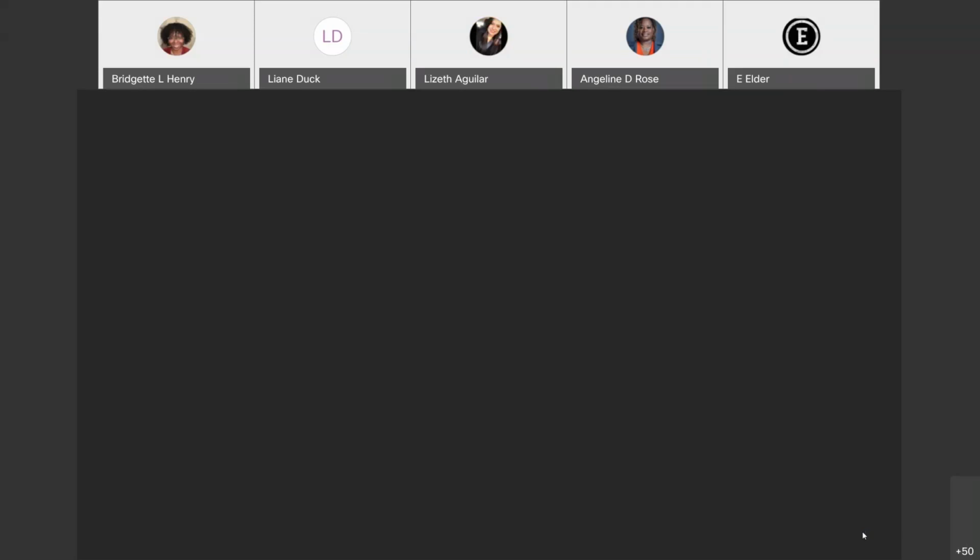And so the change control process should involve the development company, senior executives, your strategic planning individuals, or those key stakeholders. It should also involve the change control board. Now, what you're looking for is for this group of individuals to identify what would be considered a significant enough change from each baseline that would require management approval, and you would include that. You may also include your project management officer, your PMO. So between the two of you, you gave me what I'm looking for.